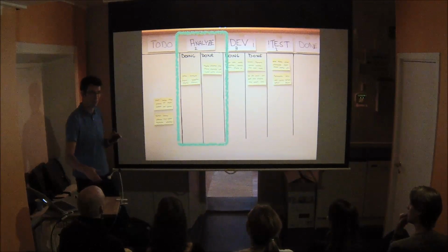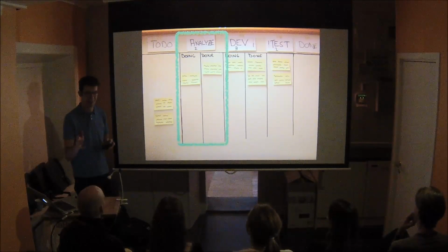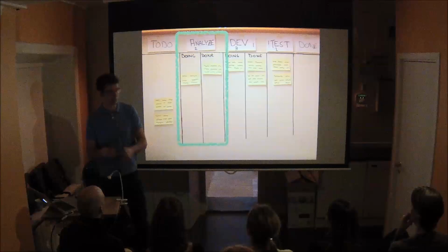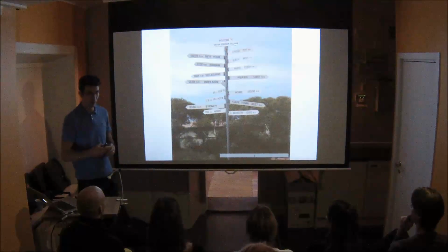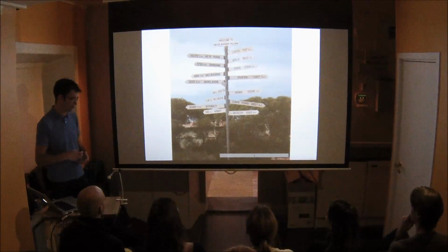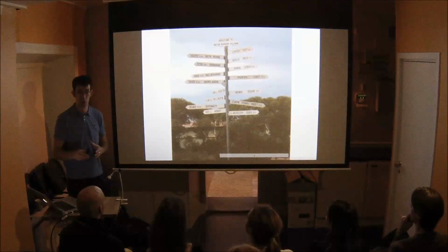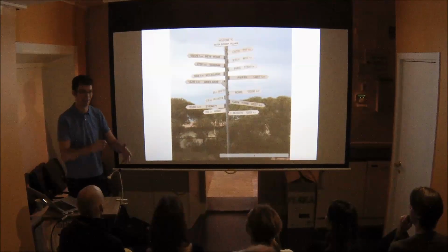But I have been handed requirements that were 1.5 years old. That's just crazy. So we want to do it just in time instead of making a stock of requirements just in case. Because doing so gives us opportunities to choose the path at the right time, when we have the most knowledge, when we know most about what we don't know yet, right?